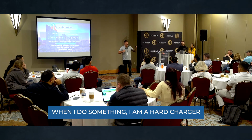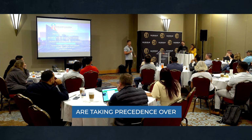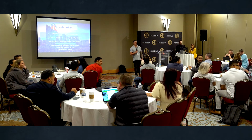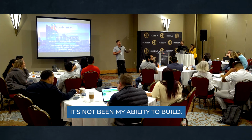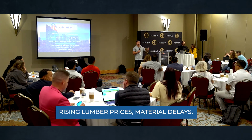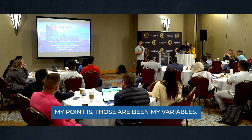When I do something, I am a hard charger, I'm mission oriented, I want things to get done. When I have to stop because of trusses, I don't like to wait. And you have national builders who are taking precedence over smaller builders and I gotta wait 7 months. Heidi, how many times have you called the building companies and asked them where the hell my lumber's at? Window delays. That's been my biggest failure. It's not been my ability to build. It's not been my ability to sell. My biggest failure right now has been external market influences. Rising lumber prices, material delays. Apparently, resin costs more, therefore so does PVC. Whatever, it is what it is. My point is, those have been my variables.